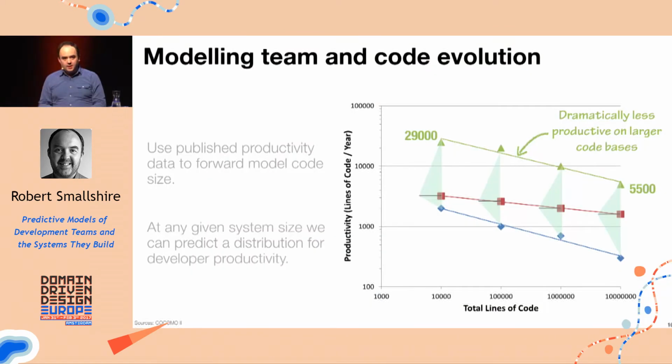Turns out, though, that people's productivity is controlled by many other factors, not least the size of the system they're working on. I can write a 20-line script starting with 0 lines really quickly, but adding 20 lines of code to a 1,000,000-line system might take me 2 weeks, right? So it's highly nonlinear with respect to the size of the system to which we're adding.